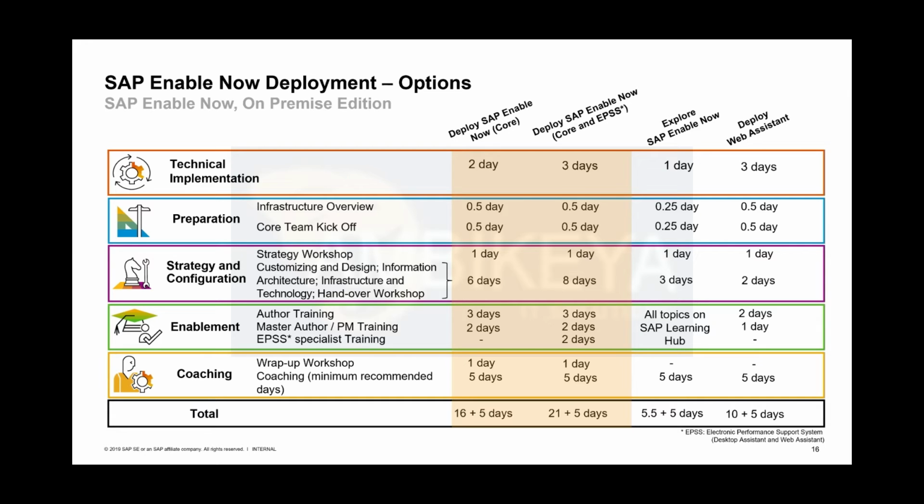Yeah, and then we as consultants simply have to be a bit more strict and say, no, I will not talk with you about business process management now and about test integration, because that's not in the scope, and we will not get our job done if we broaden the scope without adding days. And that's probably a lesson that we all have to learn, that we need to be more strict here and not just follow the requirements of the customer and spend our nights to fulfill those.